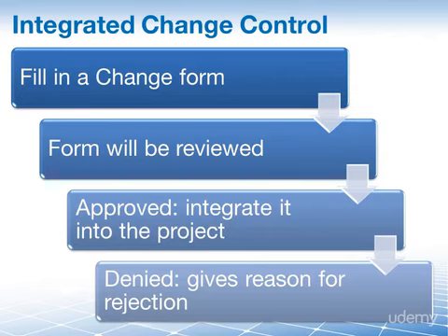And by the way, it's the same with emergency change requests. If there is an emergency, go ahead and implement the change right away to fix the problem and get the system moving again. But then, follow the appropriate procedures, and feed the change into the system for review.